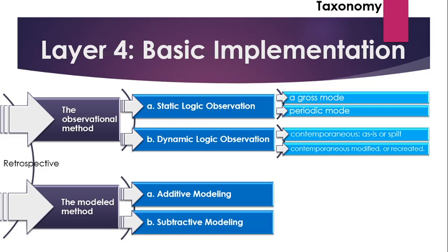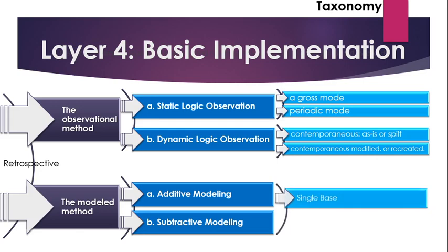The additive or subtractive modeling method can be implemented as a single base simulation or multi-base simulation. The distinction is whether, when the modeling, either additive or subtractive, is performed, the delay activities are added to or extracted from a single CPM network or multiple CPM networks. For example, a modeled analysis that adds delays to a single baseline CPM schedule is a single base implementation of the additive method, whereas one where delays are extracted from several as-built simulations is a multi-base simulation implementation of the subtractive method.